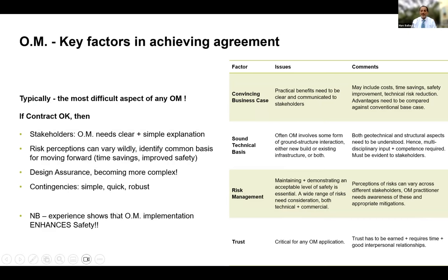Why, in your opinion, would OM enhance safety? Well, take, for example, the common use in multi-propped deep excavations. Trying to install a prop at depth, say at 30 meters, is a huge exercise. It's difficult and in itself quite dangerous for operatives working on the site. So if you don't need to install that extra support at depth, that's a major benefit.